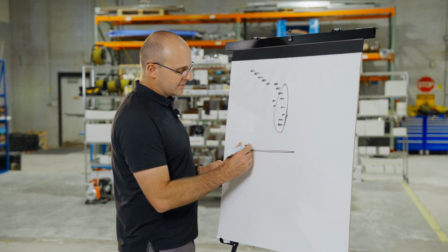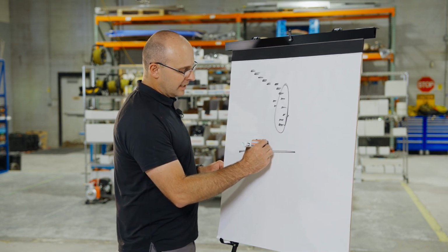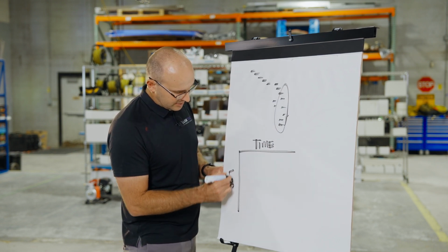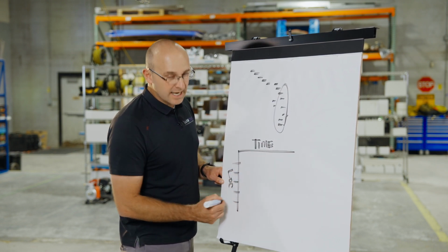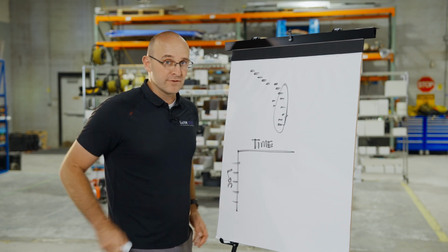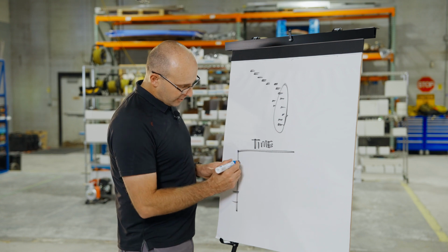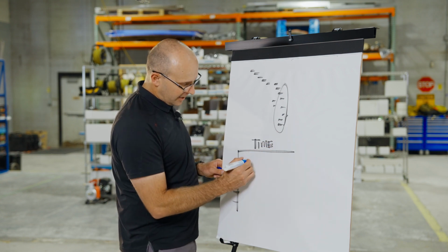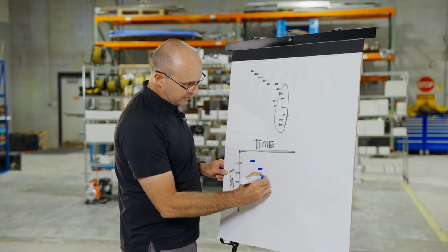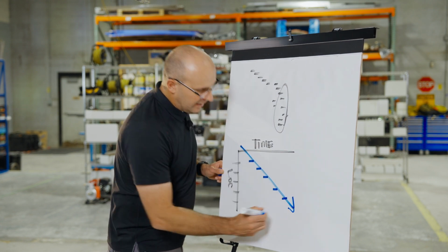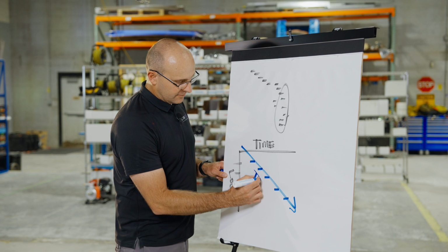On the top, you have time. And on the left, you have location. And so once we have location broken up by zones, guess what shows up beautifully that we can manage? Your crew going from zone to zone to zone in time, and it will look like a beautiful cascade, and you'll see this diagonal flow, and that is called trade flow.